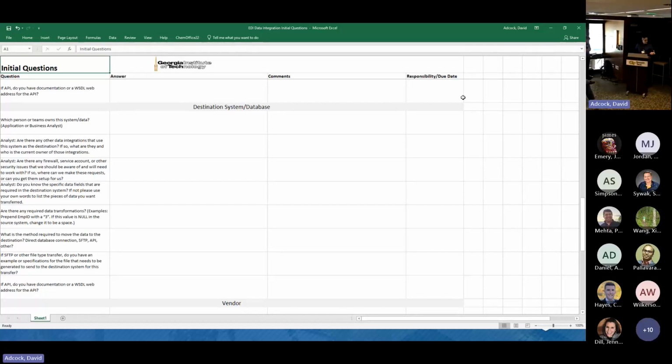And then the last section is, if there is a change in requirements that is going to impact the timeline of other projects, we have a series of questions that we ask about the availability of resources, project needs, project timelines and priority, and our overall big picture scope of work. And after thinking through these questions, we will have a better idea of how to proceed when there's a change that's going to impact more projects.